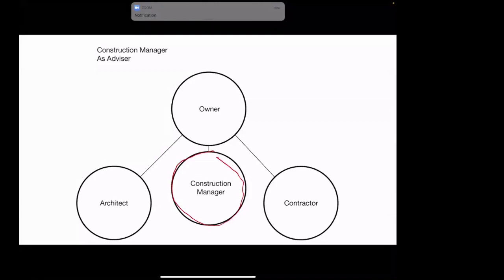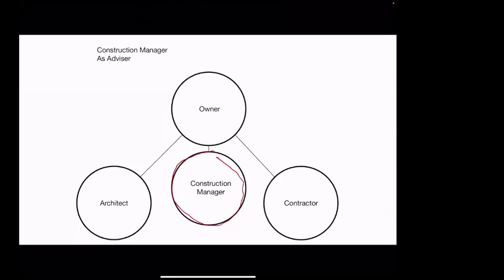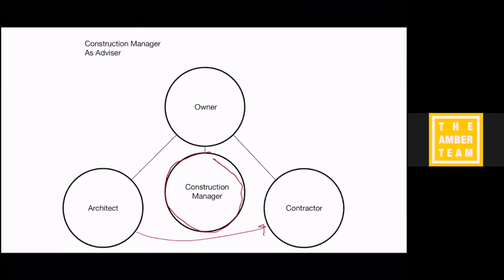It's not very waterproof. We've seen some bad results with other contractors. Or you really need to work this into the contract, because we've seen in the past that contractors have tried to skimp on this if it's not explicitly set out in the contract. But mainly the construction manager was introduced, at least originally, to speed things along as someone who is an expert in construction feasibility, and who can move the process along from the beginning and still maintain an adversarial relationship between the architect and the contractor, so that the owner can get high quality from the architect and a good price from the contractor.